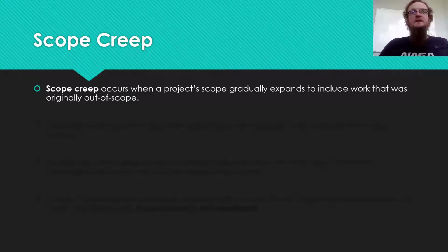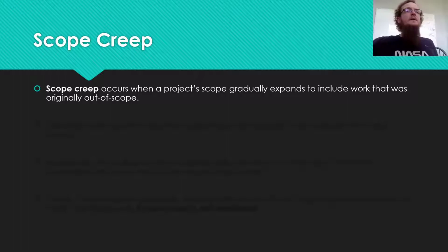This can be something as explicit as a new batch of functionality that was never thought about previously, and so the development team had no idea that this series of requirements were required. You have to be careful when adding requirements and make sure that those requirements are actually relevant to things that are in scope work. If you're adding requirements for out of scope work, you have to be very clear that it's in a different phase of the development, or at a different release or something like that, then it isn't actually budgeted for in this actual phase of the project.